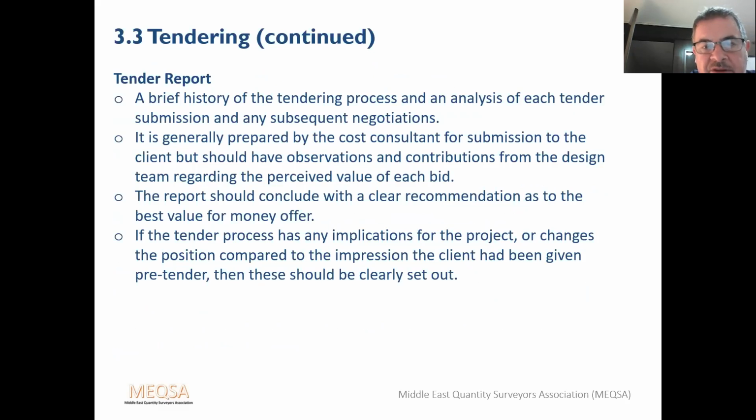It's generally prepared by the cost consultant for submission to the client, but should have observations and contributions from the design team regarding the perceived value of each bid. The report should conclude with a clear recommendation as to the best value for money. If the tender process has any implications for the project or changes the position compared to the impression the client has been given pre-tender, then these should be clearly set out.